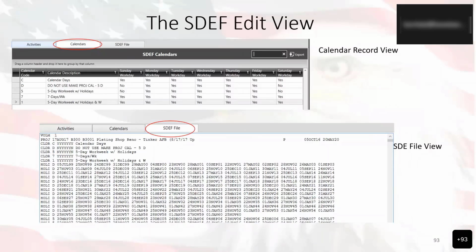The core can switch to a manual schedule for a Gantt schedule or a NAS schedule, whatever is required by the contract. So if importing an SDEF schedule into RMS contractor mode is under import module, you usually have the contractor import this module, and then once the contractor imports it, the contractor will then send it over to the government so that the government can then view that particular module and approve it.